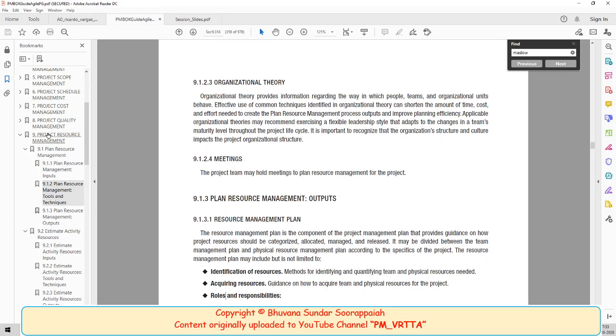There could be any formula. You can say, in my project, in my part of the world, in my example, optimistic is always 2 times more likely than pessimistic, and my most likely scenario is 7 times more likely than pessimistic. So 2 times optimistic plus 1 time pessimistic plus 7 times most likely, divided by 2 plus 1 plus 7, which is 10. That you can also use in statistics.